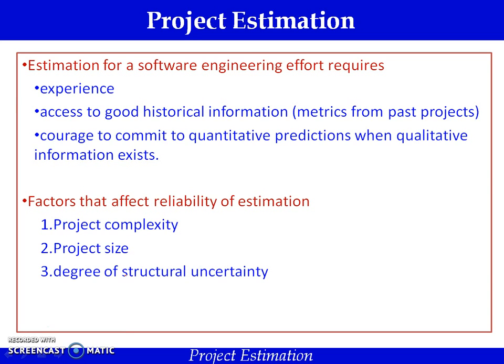The factors that affect the reliability of estimation. The first one is the project complexity. If we take a fresher, he may feel even developing a simple e-commerce application is complex, whereas a team which has already developed more than 10 e-commerce applications may take the current project as moderate or simple complexity. The second factor is the project size.